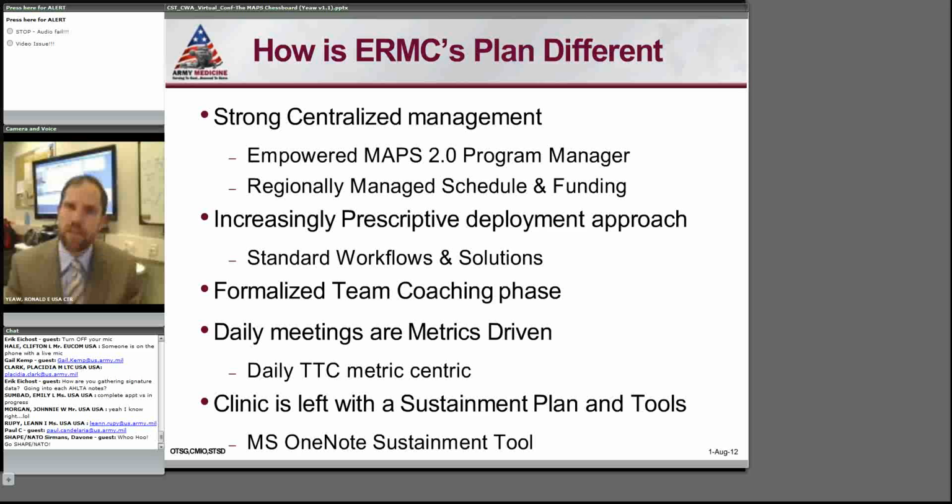So what we found going from MAPS 2.0 to MAPS 2.0 for primary care is there are some ways to do things right. Now, this isn't to say we have to force our template, but we come in with examples of how we think the front desk should operate. Documented workflows on how the screening should work. Documented workflows on what goes in the T-SWIFT, where to use the MDET. We have sample macros that we bring in. Additionally, when I talk to the command, I have sample metrics I think they can get after. We come in more and more with what I think right looks like right off the bat.